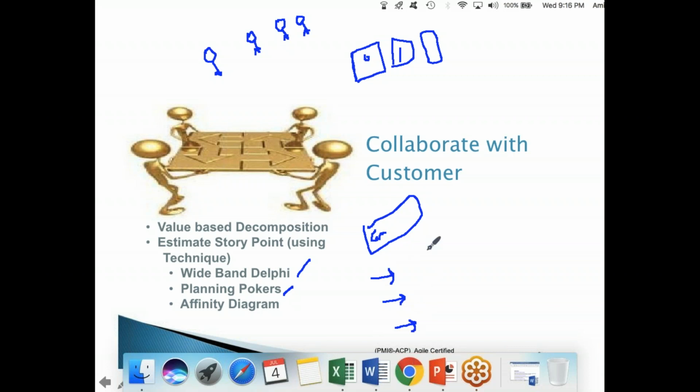Then again, I will play the second round. If creating a close button is 1, what is cancel booking? Now all of you as subject matter experts have an idea how difficult it is with all this functionality the customer is asking. Then again, I will give a shout in the second round. 1, 2, 3. You all show very close to 20 or 18. Some number you will show. At least close to that.